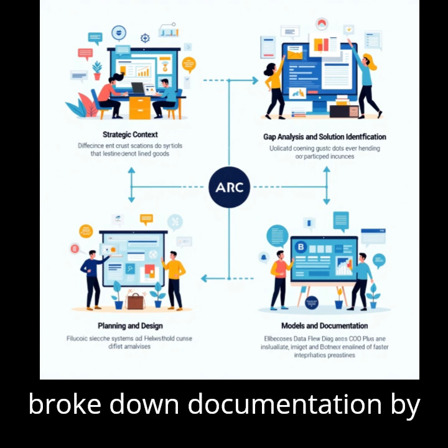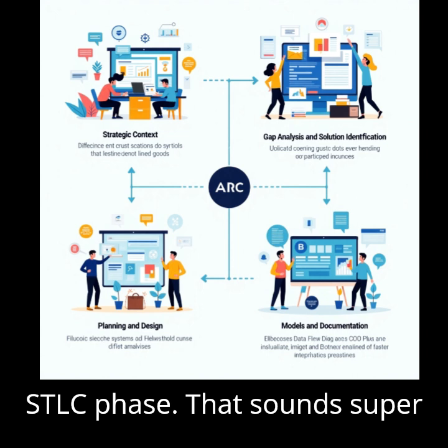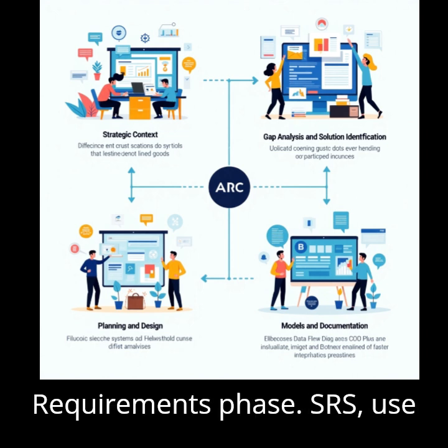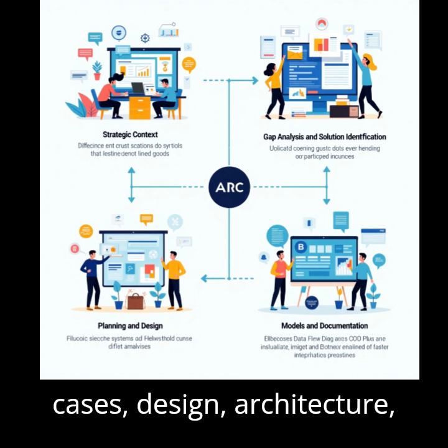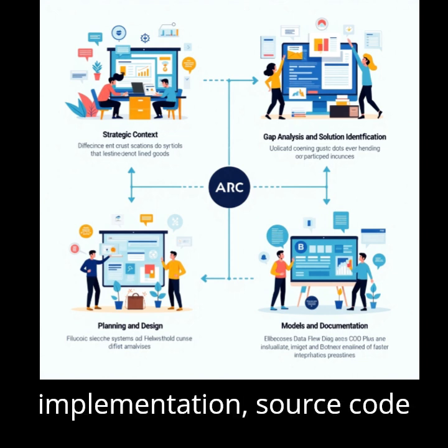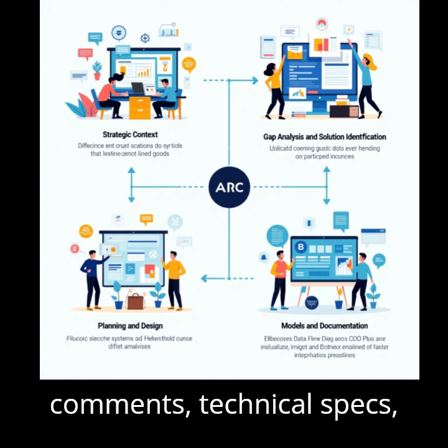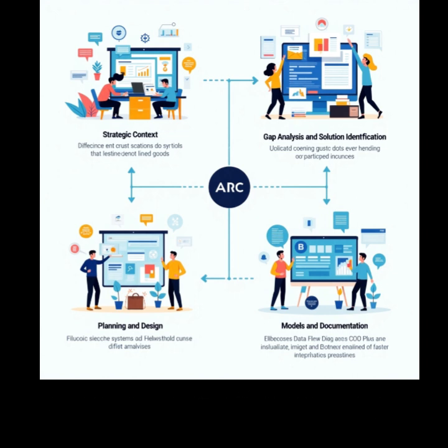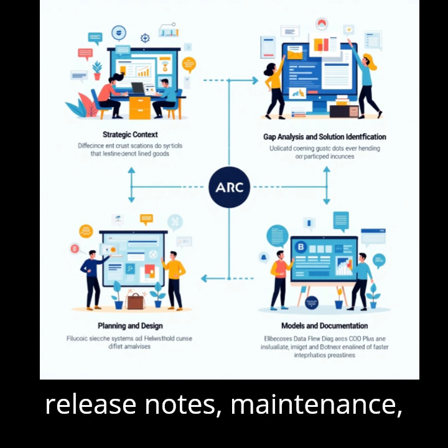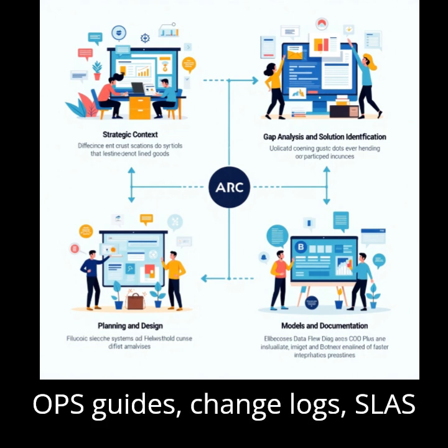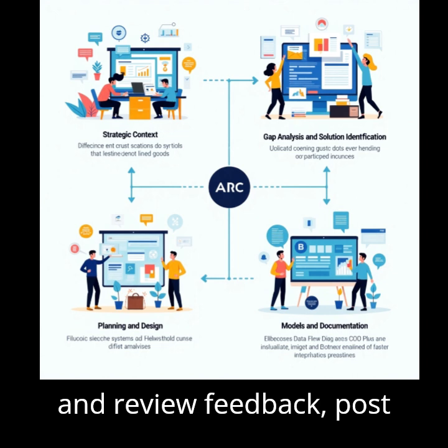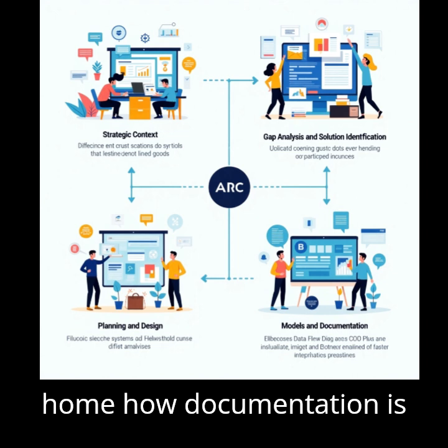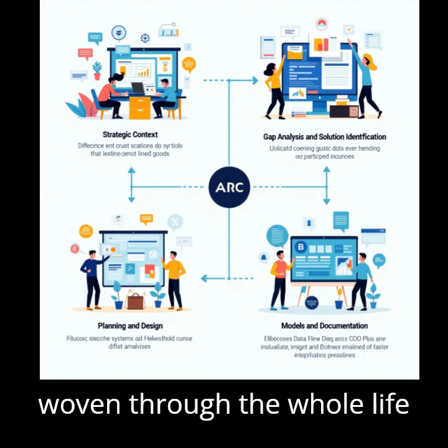The materials even broke down documentation by SDLC phase. That sounds super practical. Yeah, very useful. Requirements phase: SRS, use cases. Design: architecture docs, interface specs. Implementation: source code comments, technical specs. Testing: test plans, cases, reports. Deployment: plan, user guides, release notes. Maintenance: ops guides, change logs, SLAs. And review: feedback, post-implementation reviews, user surveys. That really drives home how documentation is woven through the whole lifecycle.